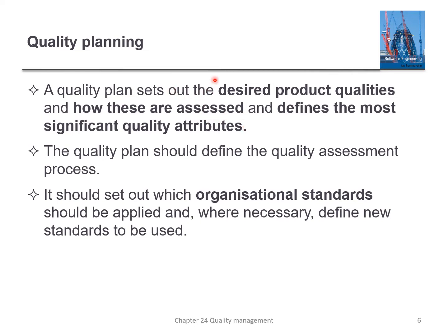the deliverables, and then out of these product qualities, you need to define the most important ones. Okay, so when you define the most important quality attributes, which refer to your non-functional requirements, you can scope down the job, so that you don't have to test or evaluate so many items.